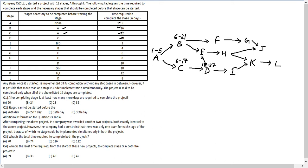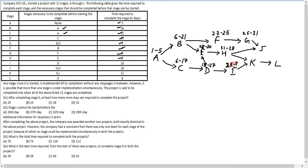Stage E takes 3 days. Both D and B are constraints, so E will only start on day 28 and go until day 30. F takes 4 days and starts after B, going from day 22 to day 25. G takes 6 days, going from day 26 to day 31. H takes 8 days, going from day 31 to day 38.